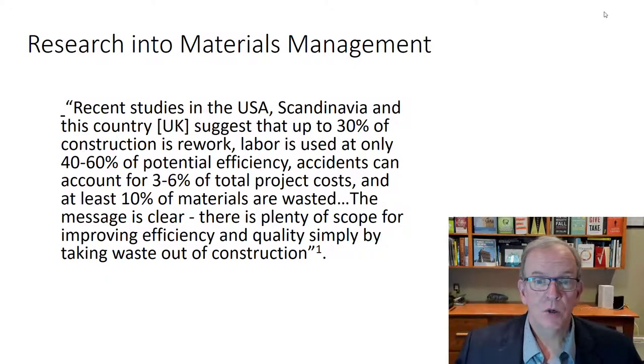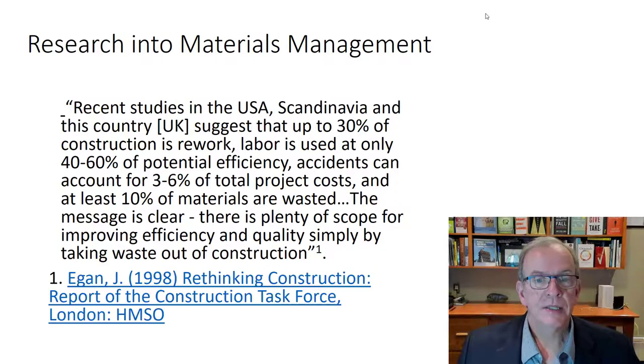Recent studies in the US, Scandinavia, this country suggest that up to 30% of construction is rework. Labor is used at only 40 to 60% of the potential efficiency. So that's telling you that you've got somewhere between 40 and 60% of waste in that. Accidents account for 3 to 6% of project costs, not to mention the moral and ethical side of accidents.